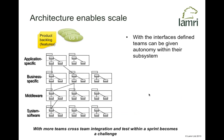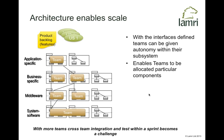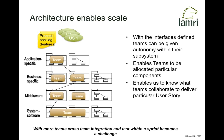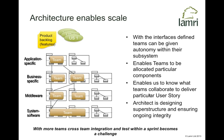Architecture is really useful for organizing teams. This doesn't have to be a massively intensive unified modeling language exercise — you can sketch it out on big sheets of paper on the wall, identifying the interfaces between architectural components. Once done, you can use that as a vehicle to allocate teams, giving teams responsibility for particular subsystems. You can then determine which teams need to collaborate to deliver a particular user story — for example, identifying which teams each need to do something critical to make a given story happen, creating a matrix slicing down through the architecture.